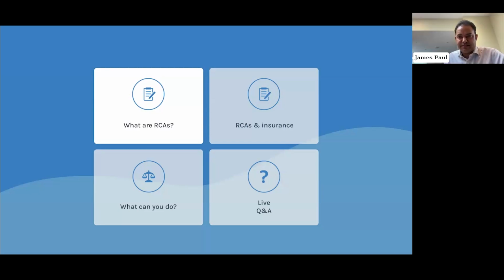An RCA is basically the cost of rebuilding a given building today to modern building regulation requirements and to get it looking more or less the same as its historical original. In contemporary new builds, this might be quite easy to achieve, but for more period buildings, like a grade 2 listed one, for instance, this may be more difficult and it's certainly more expensive. The higher the building listing may be, the closer the attention to detail that has to be paid towards making it look like a genuinely convincing replica. No, it's not a legal requirement, but many insurers will want to see some sort of methodology behind the insurance sum before they start providing you with cover.